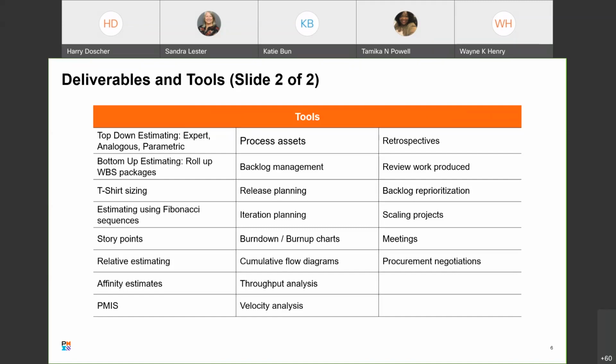Okay. So with planning poker especially, each person estimates for themselves what the effort would be, and at 2, 3 go, you flip over your card as to what your estimate is. If you've got any outliers, say someone estimated it as a 1 and somebody estimated it as a 12, then you have a discussion.